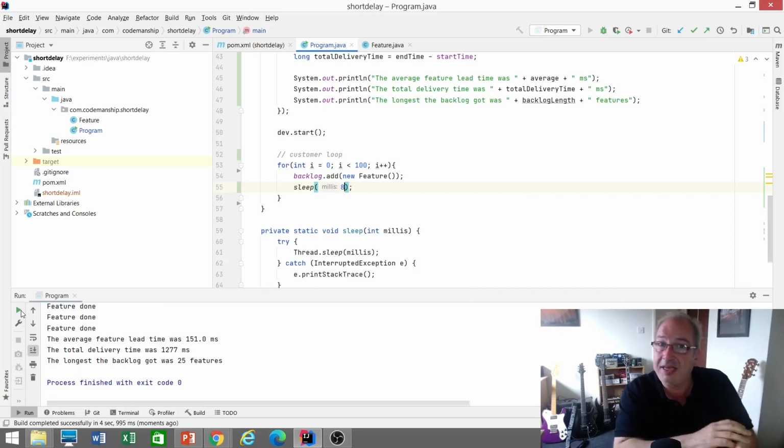They really do need to be in sync in order for the team to be responsive. The customer can't be scheduling work faster than the team can perform it, because when they do, that queue builds up, that backlog builds up, and the team becomes less and less responsive. And I see that in the real world over and over again. Teams that are overloaded, managers who are trying to get 100% from the team, and they think that's the goal. The goal is to use the team 100%. They must be busy all the time.